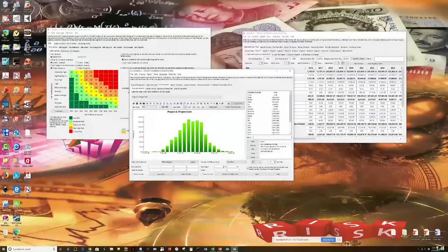We can actually do a left tail, for example. So anything to the left, and I'll do a percentile of 99%. So the 99%, as you see on your screen that's going to pop up momentarily, is a vertical line. And you will be able to see that the 99% says 8.5 million approximately, rounded. So on the expected value, on average, you are saying single point estimate is going to cost $8 million.